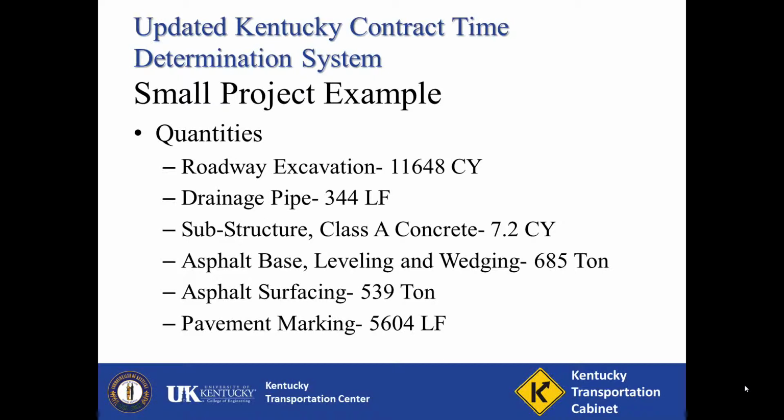The controlling activities have been determined as roadway excavation, installation of drainage pipes, substructure concrete work, asphalt base and asphalt surfacing, and pavement markings. Other activities not included might be guardrail, sign installation, etc.